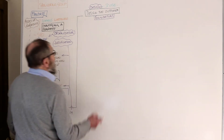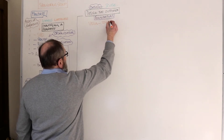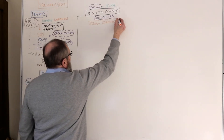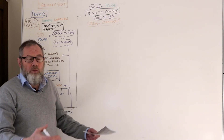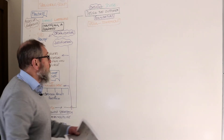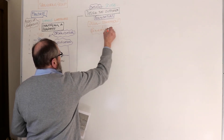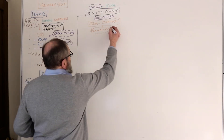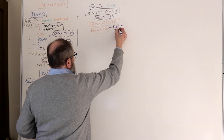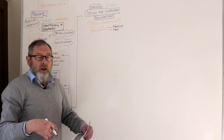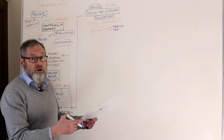The key activity within design the outcomes is to understand the vision, and therefore provide the vision statement — to give a feel as to where we are in the future. This is the new us, this is how we are now working in the new future. Linked to that are the benefits, and from that we need to track the benefits in the benefits profiles, and also the benefits map, which shows the relationship between capabilities, outputs, outcomes, benefits, back to the organization's investment and objectives.